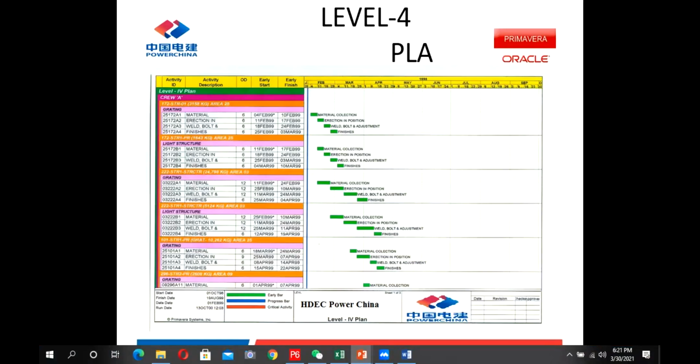We will discuss here up to level 4, but I'll just tell you what level 5 is. Level 5 is only when we further detail it up to the equipment part numbers. This is called level 5. This is normally done on manufacturing schedules.